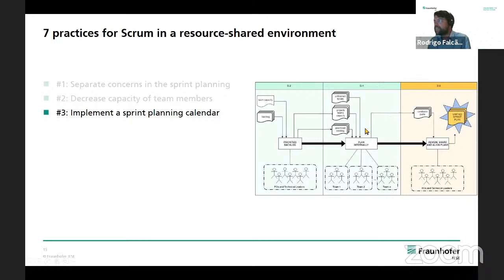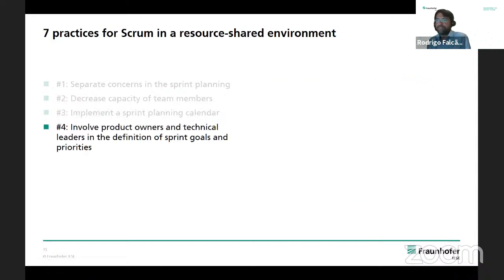Then the other day, we had another meeting to plan in detail how the prioritized backlog items would be realized and what would be feasible to do within the capacity for the sprint. And then on the third day, we had a final meeting to align the plans and check whether there was something conflicting among the plans, to consider the plan done.